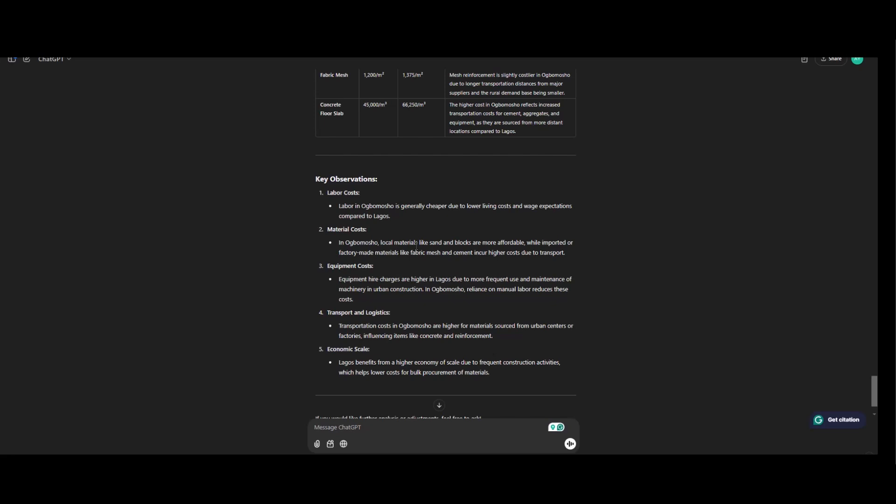In Ubumosho, reliance on manual labor reduces this cost. Transportation and logistics. Transportation costs in Ubumosho are higher for materials from urban centers or factories influencing items like concrete and reinforcement.